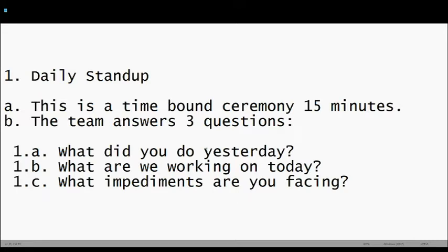If it's a dependency on the other story, you can do that. So as a scrum master, you have to do that. If it's dependent on some other story, then you have to connect the stories to keep track that this was dependent on that. And you have to mention in the comments, okay, this is what the progress is so far, this is what is going on. Some teams do that, some teams do not, but that is what you will do.